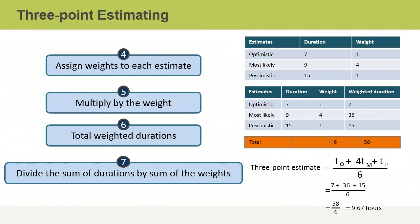The next step is to multiply each of the estimates by their respective weights to get the weighted durations. The most likely duration of 9 hours is multiplied by 4, giving a weighted duration of 36 hours. The optimistic and pessimistic estimates are weighted as 1 and so remain the same, 7 hours and 15 hours.